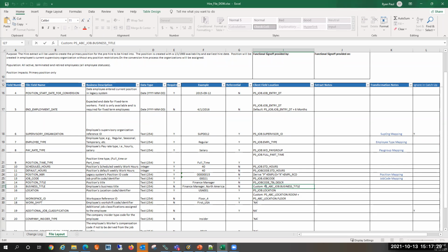That also, you know, a fair question to ask a potential implementation partner as part of the RFP process is, we would like a sketched-out timeline plan. It doesn't have to be super detailed. And also ask questions like, what's the commitment from our individuals? Do we need to commit 50% of our subject matter experts' time? Do we need to commit 100% of a developer's time to support conversion? That'll also help you know what you need to support the project in addition to just having a partner.